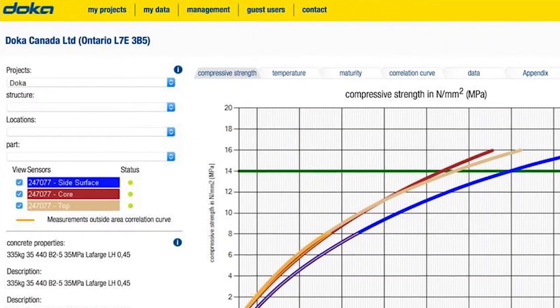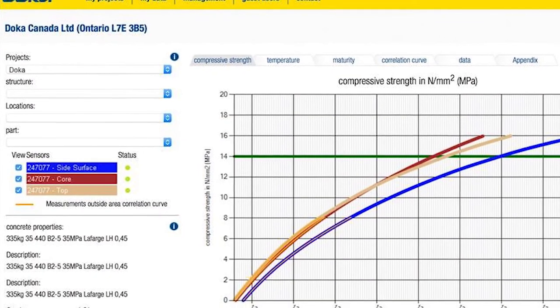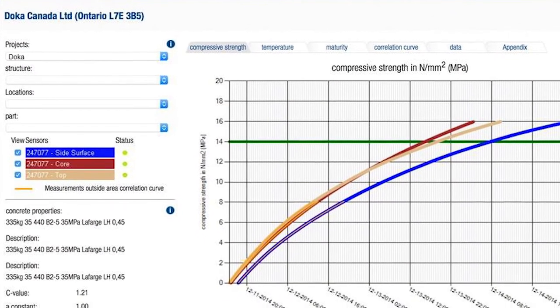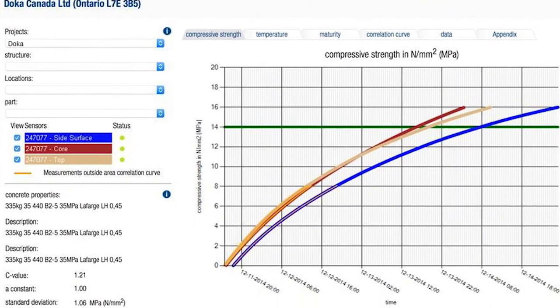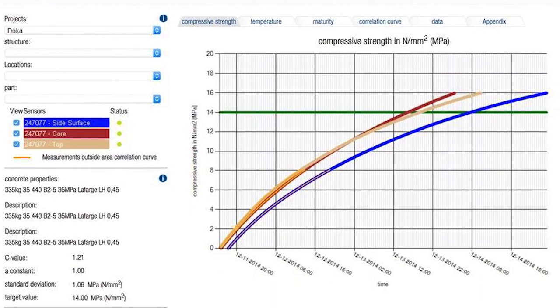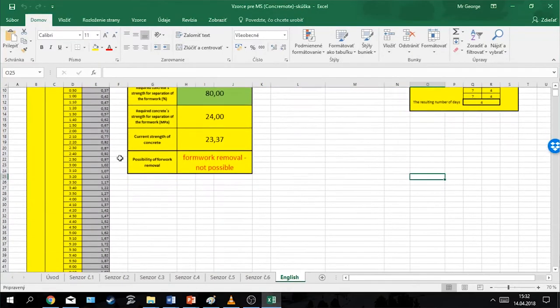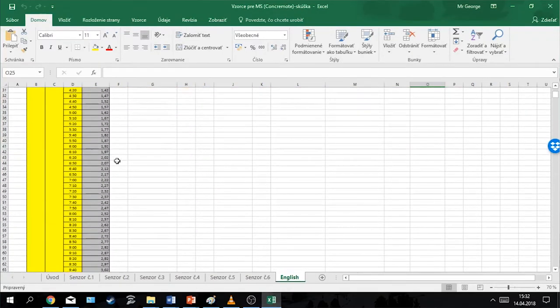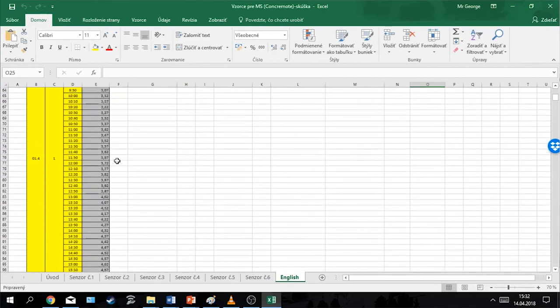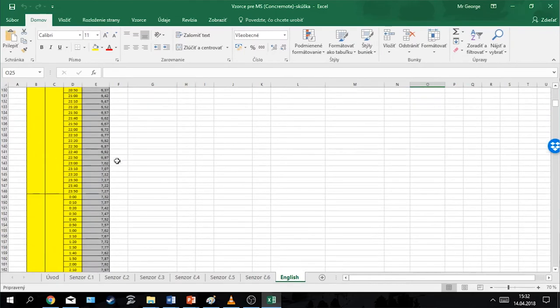Our work began with the idea of possible automation of the information obtained from smart sensors. These sensors are capable of providing information about the strength of concrete based on temperature, and a construction manager can receive this information in real time in order to make decisions. This could be the next step for BIM usage in a construction process, where smart sensors on vehicles, workers, and objects will be connected to BIM in real time.